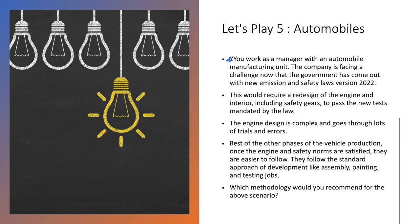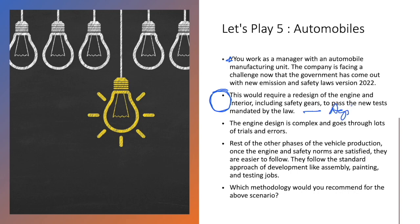Scenario five: you work as a manager at an automobile manufacturing unit. The government has issued new emission and safety laws requiring a redesign of the engine and interiors. The engine design is complex and goes through many trials and errors. Once engine and safety norms are satisfied, the rest of vehicle production follows a fixed standard approach like assembly and painting. The engine redesign phase requires many iterations and revisions — use agile. The remaining phases are predictive. This is a classic case of hybrid methodology.